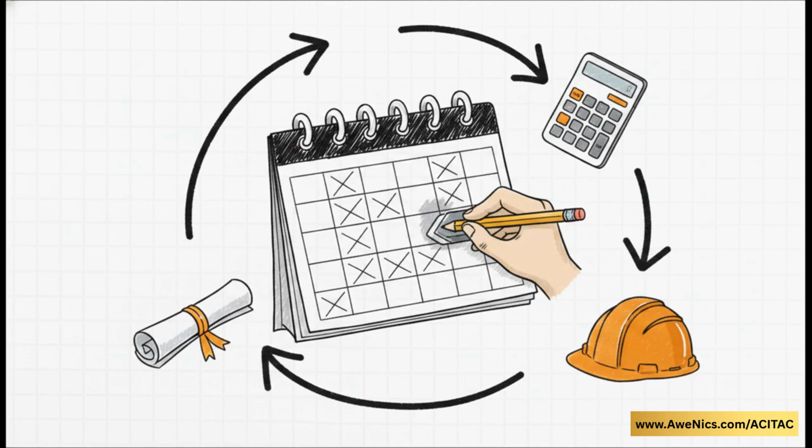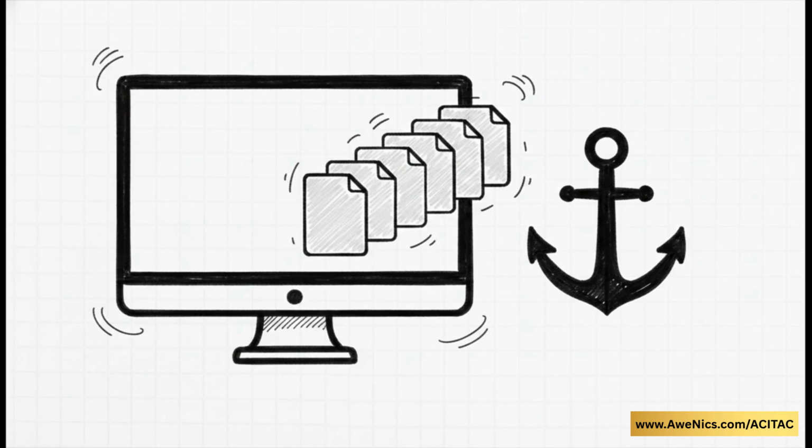But then next week, the client talks to the architect and decides to completely alter the design. Suddenly, all your quantities need recalculating, and your resource allocations have to be completely updated. You've got to revise your schedule, shifting all these activities around, even though your actual project start date is still June 1st. Luckily, project management software totally expects these pre-execution changes.